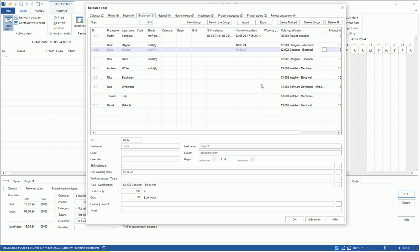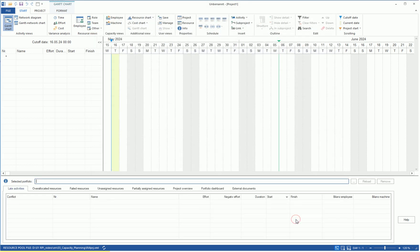Now, we have defined the resource offer through the resource pool, including the skilled workers with their professional qualifications, working hours, and non-working days. Then, we confirm the changes in the resource pool with OK.